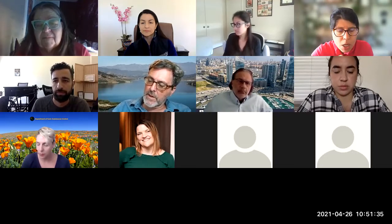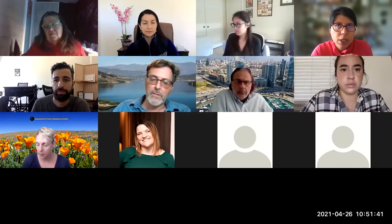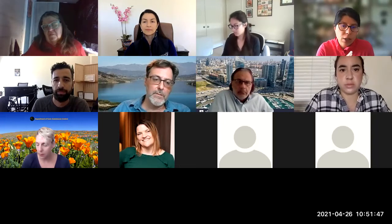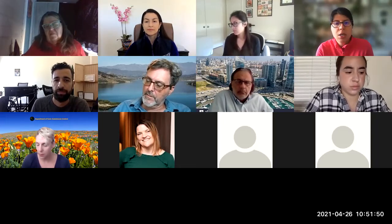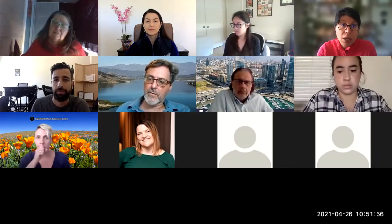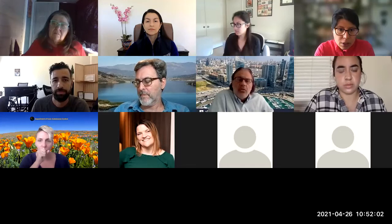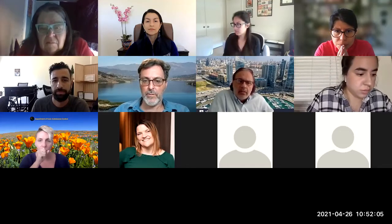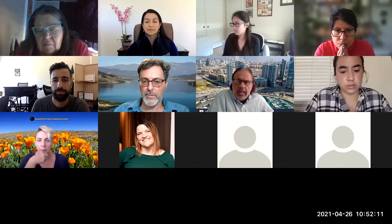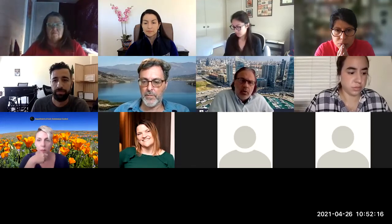Thank you. So how do we interact? Just for my clarity, because I think you bring a good question, Liz, where do we end and where do they start? Or do we start at the same time? As we are obviously looking at the contaminated soil, is the local air district working on the demolition of the building and also ensuring that the asbestos is being remediated accordingly? Usually they need a permit with the air district to conduct that demolition of asbestos. And we can communicate with the air district and encourage them to listen in.